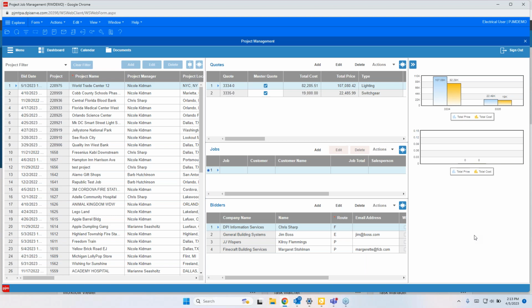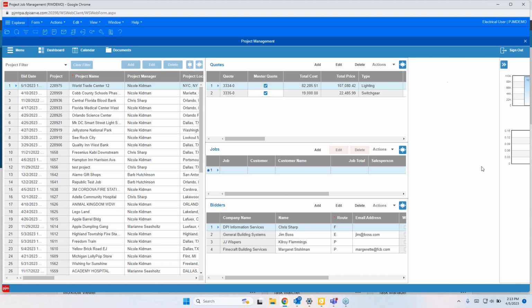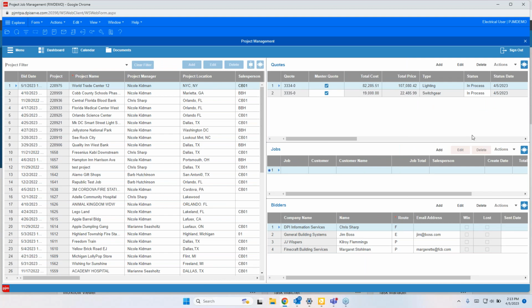But you may want to have something like this on the job header, or maybe a place where you can see what's been billed so far, what's left to be billed, what's left to be costed, and that kind of thing through a job, or things that haven't been released yet, right? So you can track those things with KPIs, or again, we can do exception reporting or build reports that will do the same type of thing.